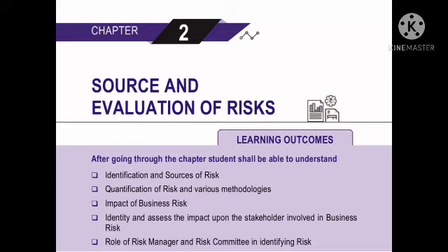Risk rating table example. Risk rating, description, risk management action. 12 to 16, severe, needs immediate corrective action. 8 to 12, high, needs corrective action within 1 week. 4 to 8, moderate, needs corrective action within 1 month. 1 to 4, low, does not currently require corrective action. Risk evaluation should consider the importance of the activity to the business, the amount of control we have over the risk, potential losses to the business, and benefits or opportunities presented by the risk.